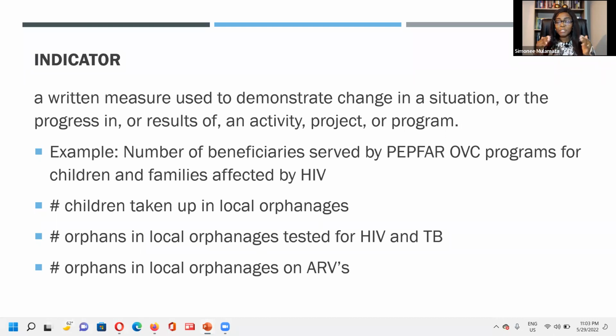We usually do workshops to develop indicators on their own in every sector, for small or large projects. It's always a team approach, and this is where your stakeholders play a major role. When you do indicator workshops, evaluate who are the individuals that are good at figures, if it's about figures, or very meticulous with analysis, if it is about things you need to analyze.